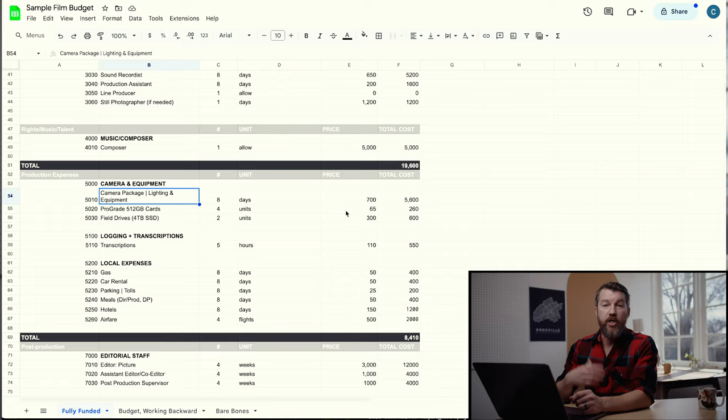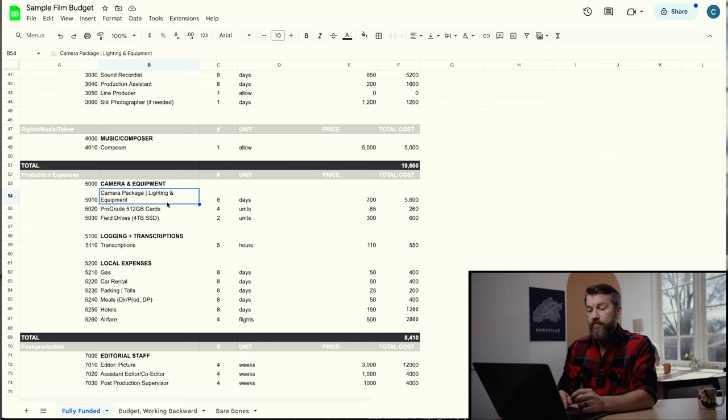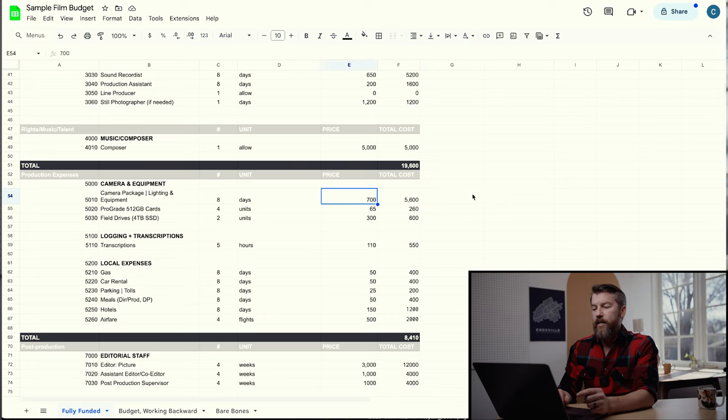The next column is production expenses — costs you incur while actually on production that you can't get around, like gas, hotels, and food. You've got to feed all the people in your budget. You also have your camera package and lighting package — the rental costs for an eight-day shoot. This depends on what camera you're using: if you're using a RED, Arri, or Sony Venice, that'll be much more expensive than a Sony FX3 or Canon C70. Talk to your local rental house or check sites like Lens Pro2Go or Lens Rentals to build your list.